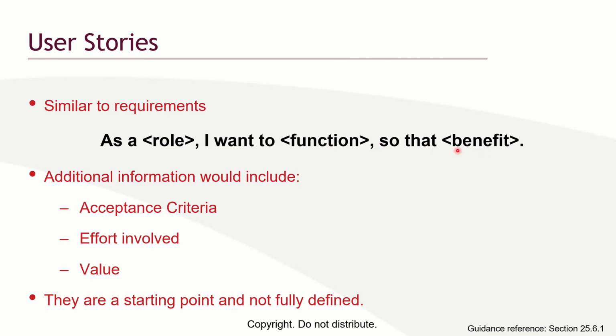What is the benefit? So that I will know those who are on leave at a point in time. I will know those who have not gone on leave throughout the year, without using, for example, a folder, without calling for a file, without having to go and look for a file. I want to be able to do that. That is a user story.